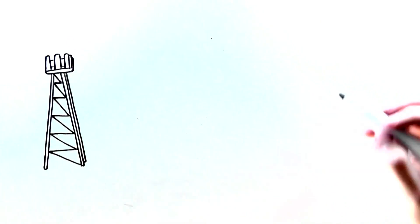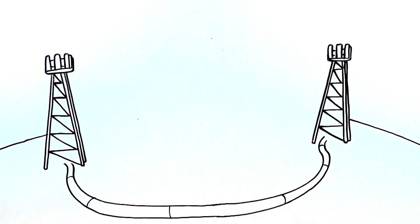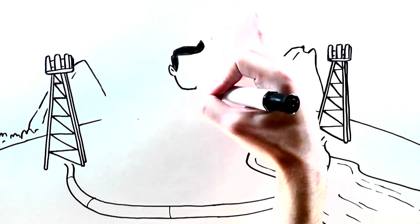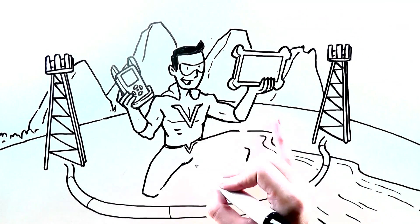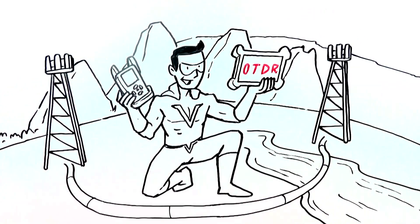All required proper testing and results are managed by Vertex. For this type of dark fiber program, the tests include bi-directional optical time domain reflectometer, or OTDR, power meter, and fiber end connector, or FEC.